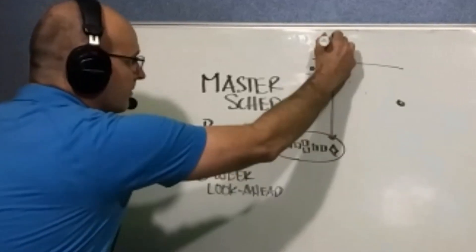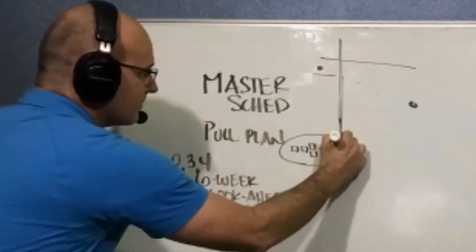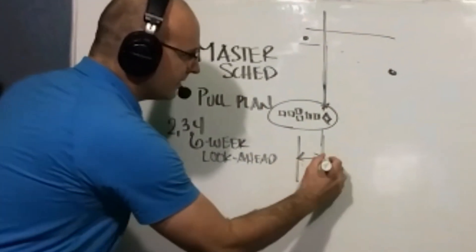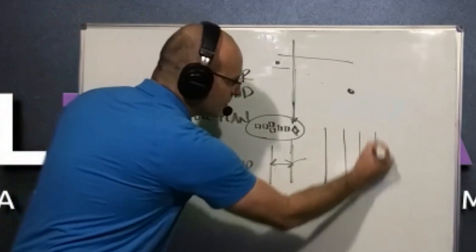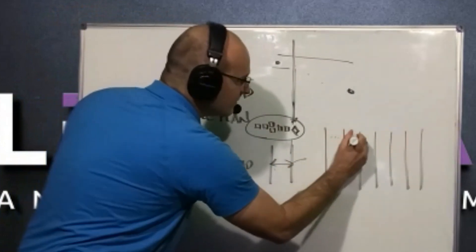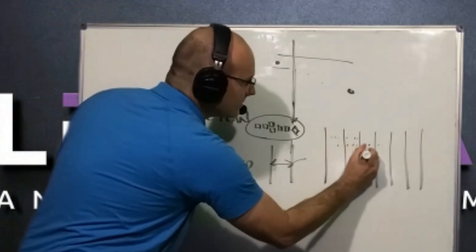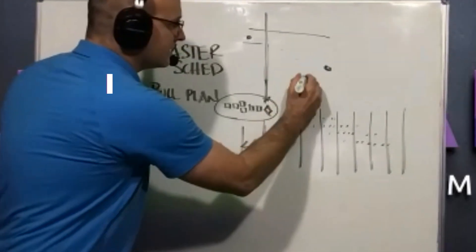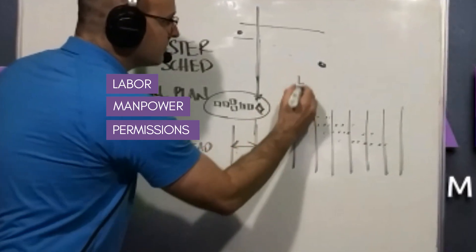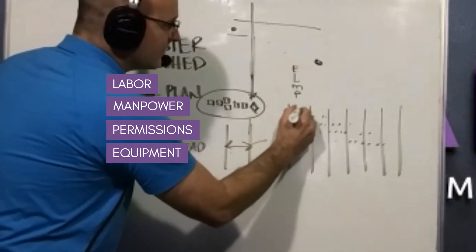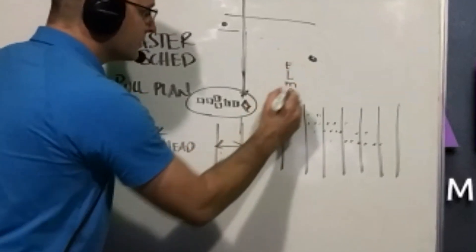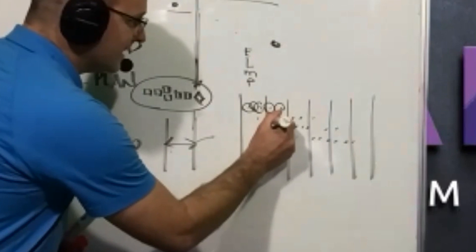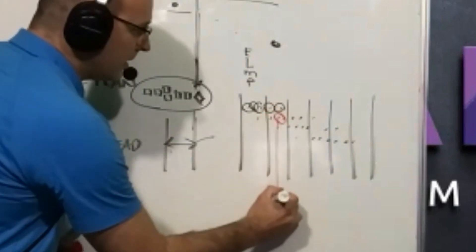From your master schedule and confirmation of the sequence in your pull plan, you filter out six weeks of your schedule. Inside that, you'll have certain activities — week one through six — and you ask: is this activity ready? Does it have the labor, the manpower, the permissions, the equipment, the materials? You ask that for each activity, and if the answer is no, then that is a possible roadblock.